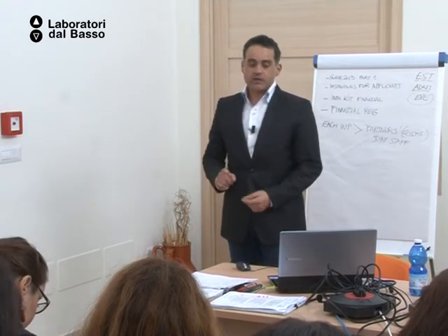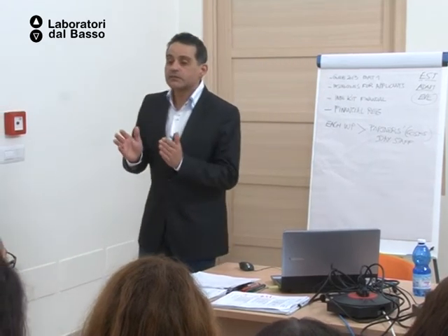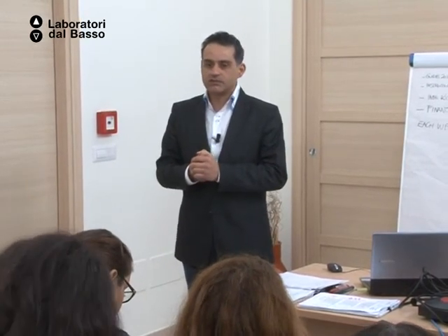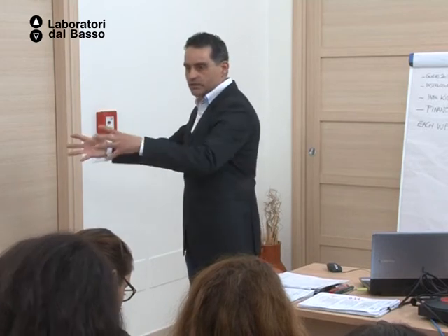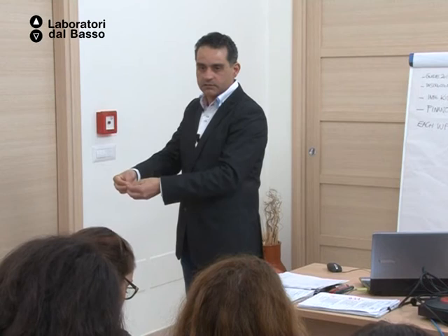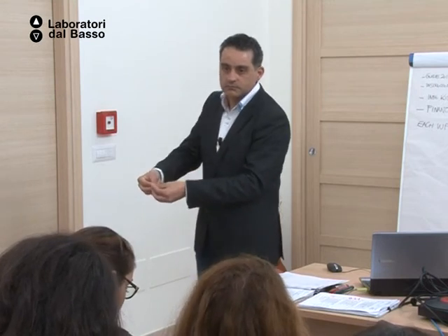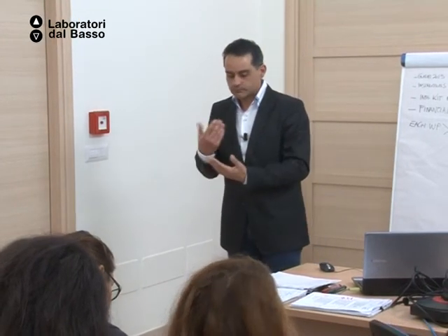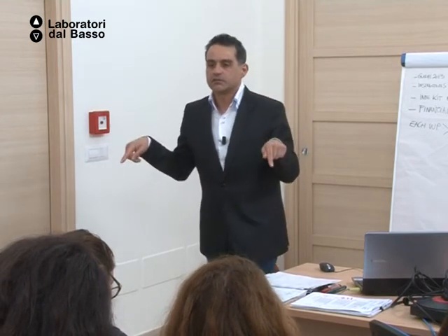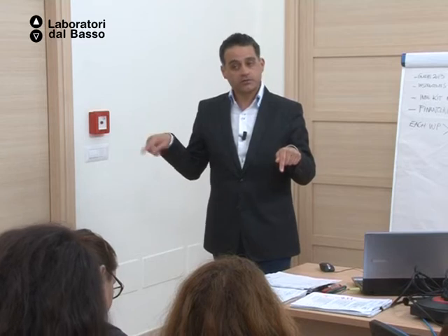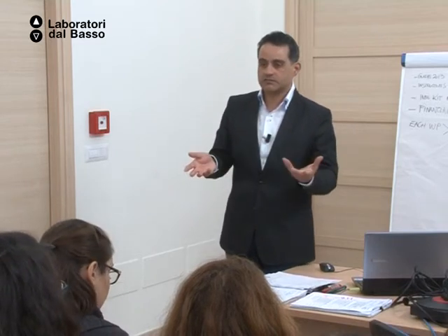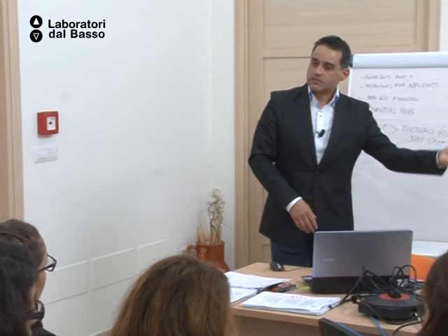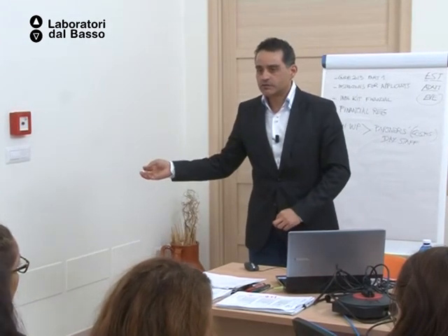Traveling, for example: travel less and stay at the meeting more days. What you need is to be together, and since different countries are going to gather in one place, spend more time together. If you need an emergency trip between the foreseen trips, you will be on your own because you didn't foresee it, unless you address the agency and ask a favor. You will have to justify the budget allocation: why this amount to this partner, why this amount to the other partners.